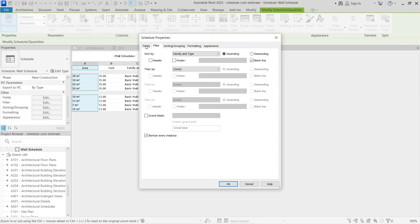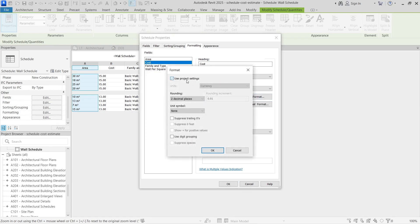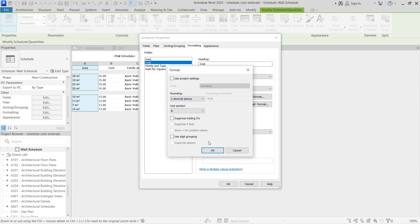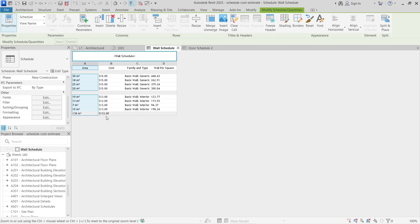In the Properties panel, scroll down and go to the Formatting tab. Under Cost, first change the Field Format — instead of using project settings, switch to the Unit Symbol and add the dollar sign. Then go to the Sorting tab, enable Grand Totals, check Title, Count, and Totals. Click OK and you'll see the total value in dollars for each wall type.